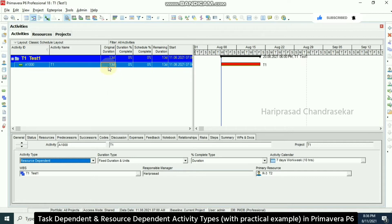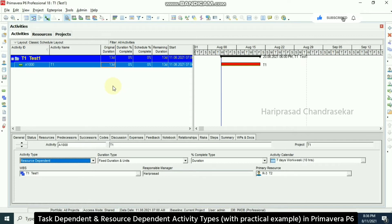The reason it became 13 days: the task calendar is seven days per week, but the resource calendar is only five days per week. To compensate, it adds another three days of delay — that is the difference.